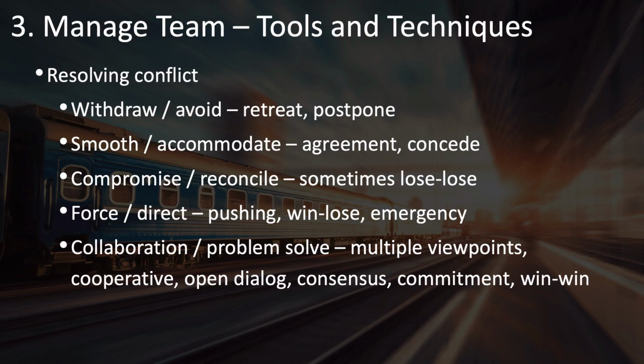The next is collaboration or problem solving. This is usually the best approach if the problem is important and if you have the time and the parties are willing to collaborate on this. This will allow you to really explore all of the different viewpoints that you have and take a cooperative and collaborative approach, having open dialogue and seeking some consensus. This will allow you to improve the buy-in or commitment from all of those involved, and is more likely to result in a long-term win-win solution.